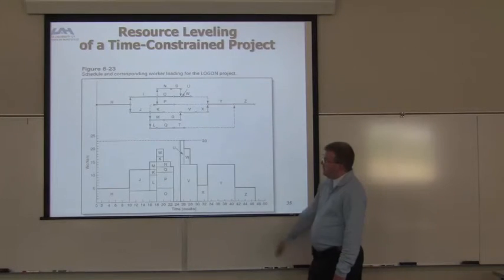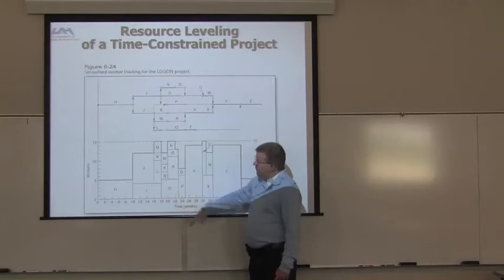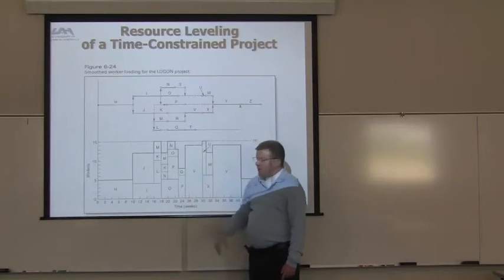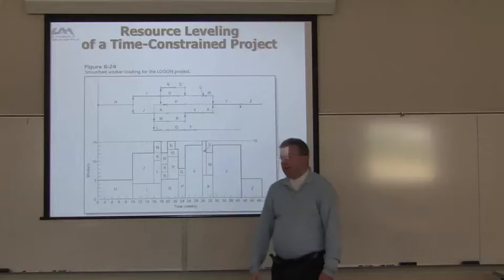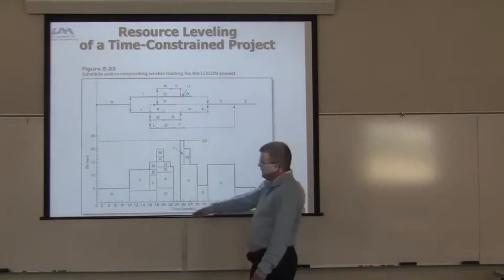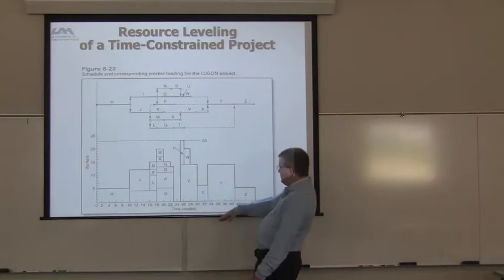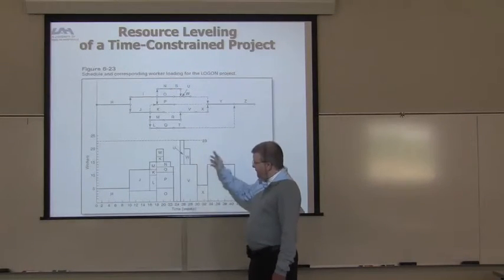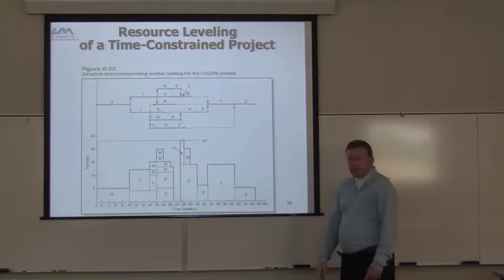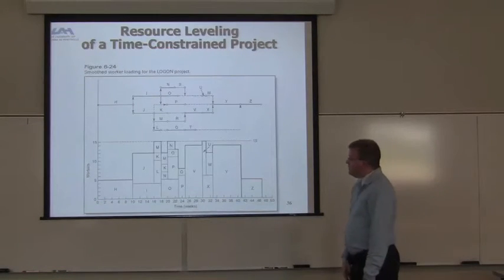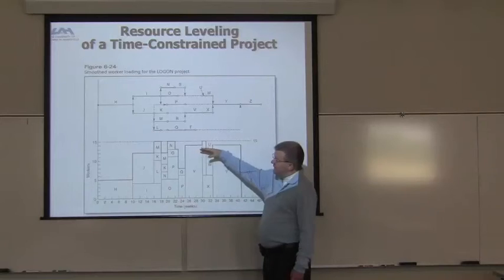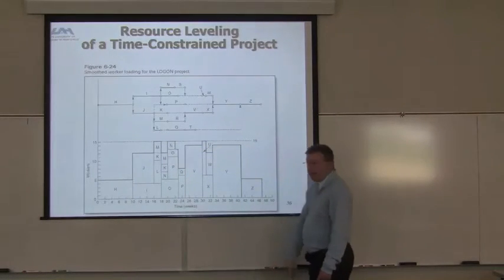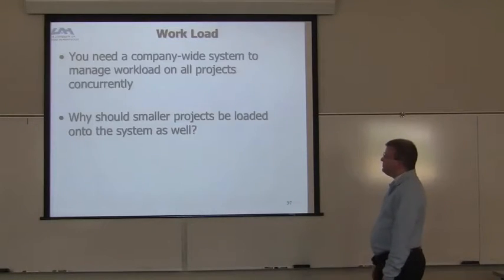So you can give them not as many people doing things. If you move things around, and with floating you can do that, then you can get the resources allocated appropriately, right? Because if you look at this, you're going from 5 people, then there's a spot here where there's nobody, up to 23 people, and then it falls back out, and so it's nuts to try to put all these people together. Versus here, you look at it, you're averaging 14, 15, 13 people right there, right? And that's a lot easier to manage in the end.